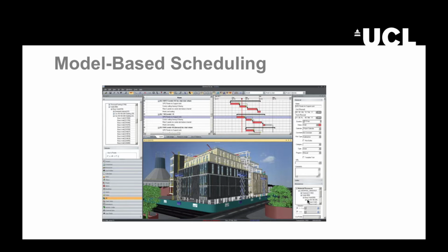As the material arrives at the job site, the planning technique and the 3D model can be combined with other BIM-enabled tools to provide construction monitoring services. Based on the construction monitoring, the construction planning can follow a clear strategy. This helps to update the schedule and the 3D model simultaneously. And finally, the record model can be generated as the final progress of the construction, as the as-built models, which are completely updated in the building information system.